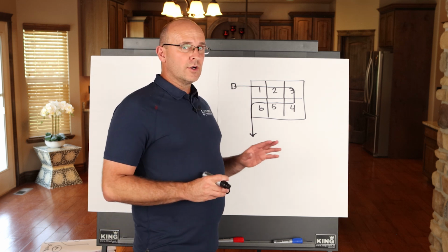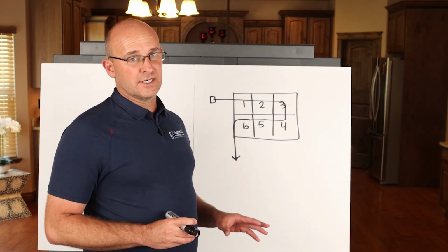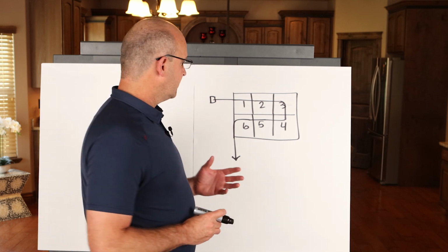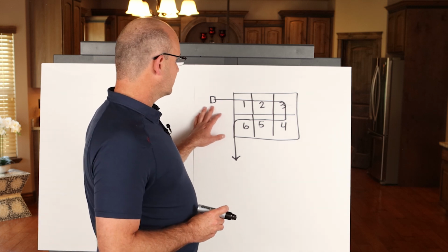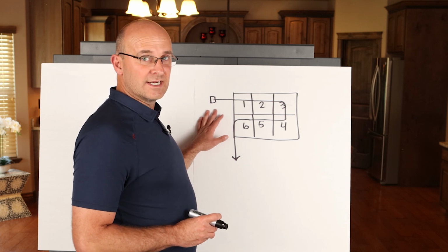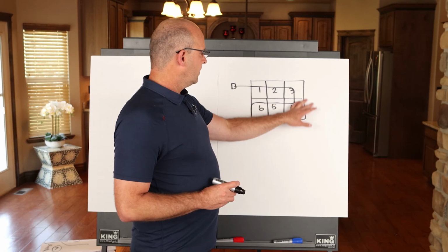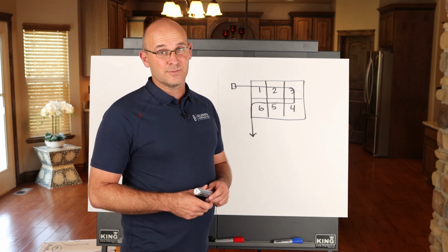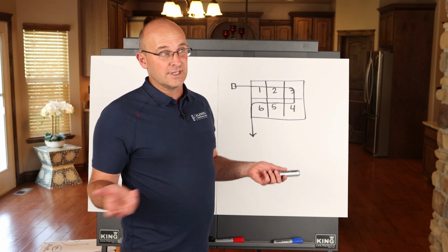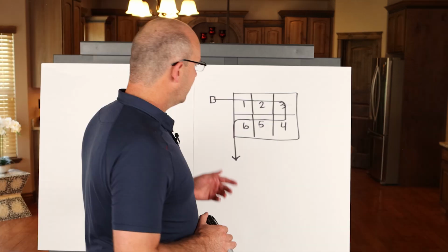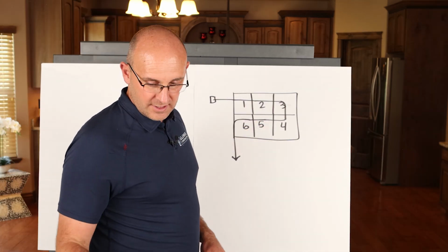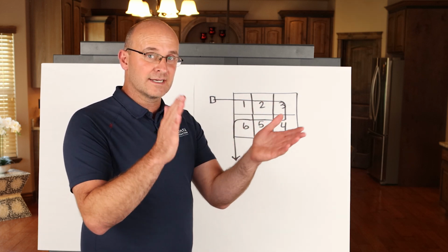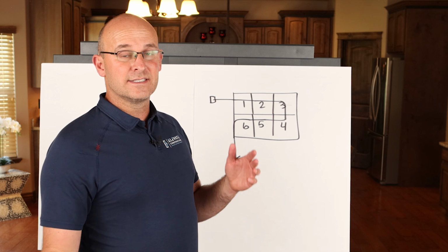So you already have a market demand projection. You already have a milestone for when the project needs to be completed. So you literally can take the amount of activities, the duration of each activity inside of a takt time, consider the number of zones throughout the project, and find out what your takt time has to be to meet the market demand. So in that case, it's the same thing. The other thing is, it also provides the rhythm. The trade partners are going from zone to zone to zone on a takt time. So that indicates the speed.